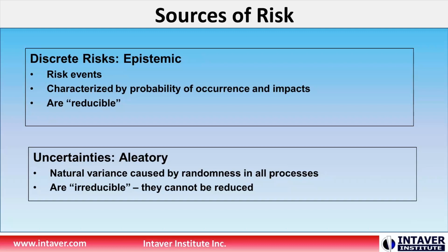The first two, avoiding or transferring, completely remove them from the project plan. If we're going to accept, then it's probably low enough that we're okay with it. And mitigation is the one where we reduce the risk. That means we're going to buy down that risk with various risk burn-down activities or mitigation plans.